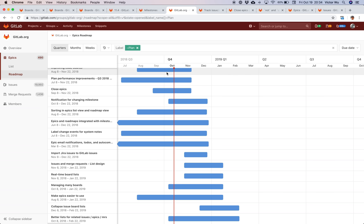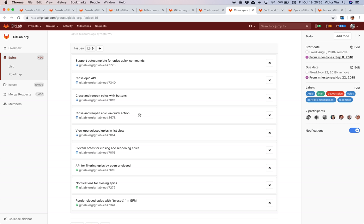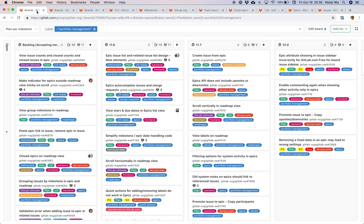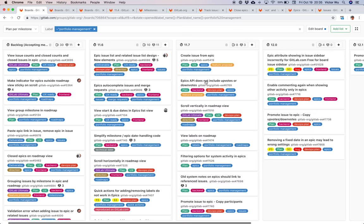To turn epics into milestones, I look at what we call issue boards inside GitLab. We've looked at epics, roadmaps, and issues — now I'm going to show you an issue board. An issue board in GitLab is similar to a kanban or agile board, but we've taken it to a whole new level. In this particular view, the lists are not workflow stages but milestones — you can see the 11.6 milestone, 11.7, 12.0, 12.1, and so on.